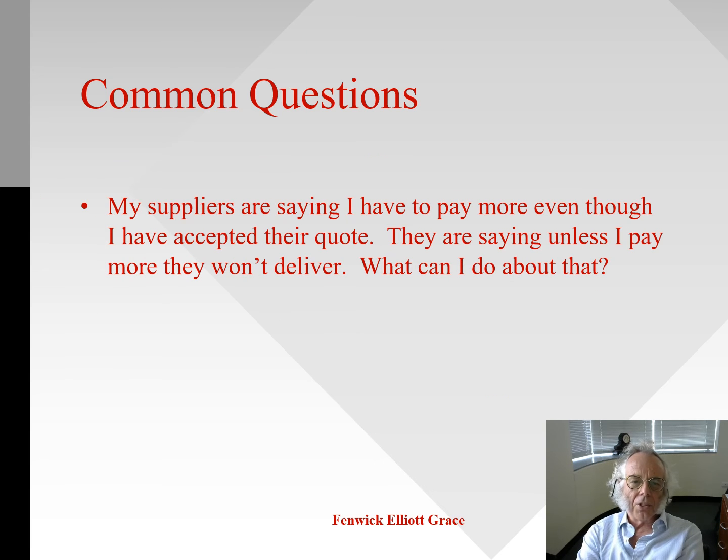Some common questions that arise are like these. My suppliers are saying I have to pay more to them even though I've accepted their quote, and they're saying unless I pay more, they won't deliver my timber. What can I do about that? Well, they are breaching their contract with you, and you have a right to claim damages from them.